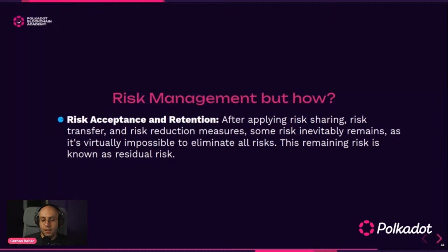We need to find the relevant stakeholder. Who is the owner of this risk? And are they going to accept the risk? If they accept, you need to manage the acceptance. You need the retention. You need to monitor it. You need to see it. Because if there's a risk, there will eventually be an event.